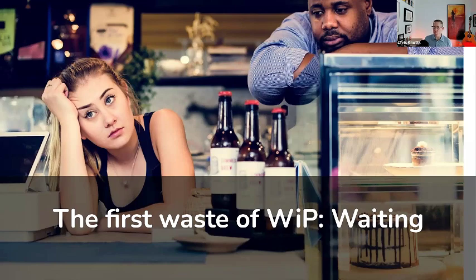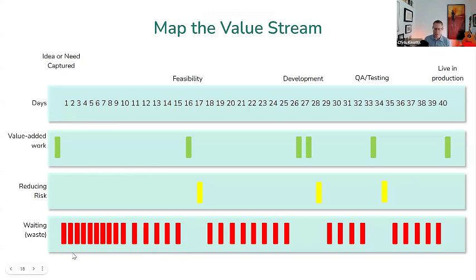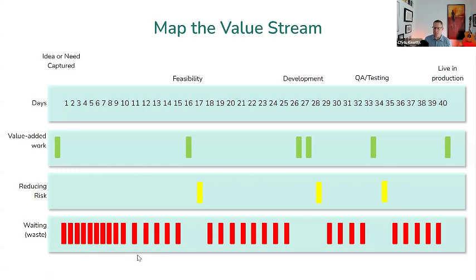This is an alternative way of looking at that workflow. If we think about how long a feature spins in a particular part of the work stream and map it, we can see that work actually being performed on the feature — shown in green — represents a small portion of a 40-day cycle. The majority of the time is spent just waiting for that feature's turn to be worked on, because we often have a first-in, first-out system. Testing teams, development teams, release teams are busy deploying and releasing the features that came in first.